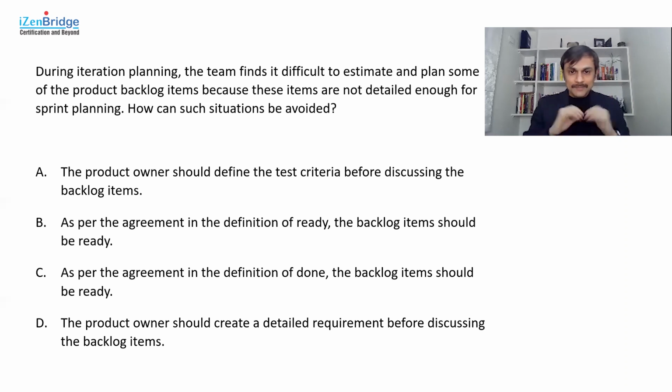Okay, so in my view, this question is primarily testing the understanding of definition of ready, and trying to confuse you between definition of ready and definition of done, and also about what might be included in definition of ready. The definition of ready might include proper definition of acceptance criteria, not necessarily test criteria, but some set of acceptance criteria might be there, might not be there. It depends upon the understanding and the nature of work you are working on. It may require some other details also, but those details cannot be just labeled as detailed. Yeah, we can say enough detail.